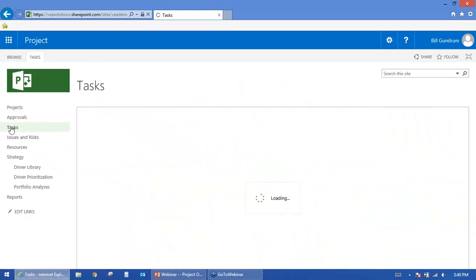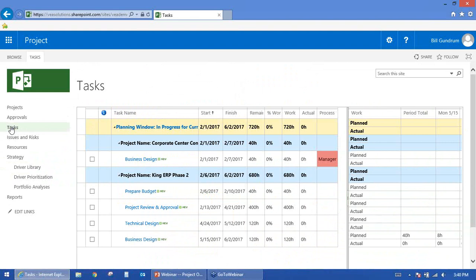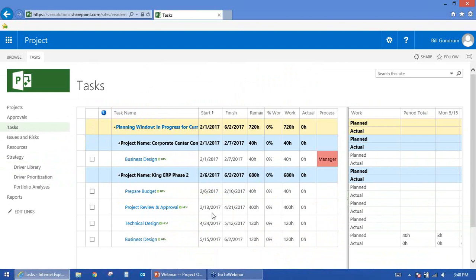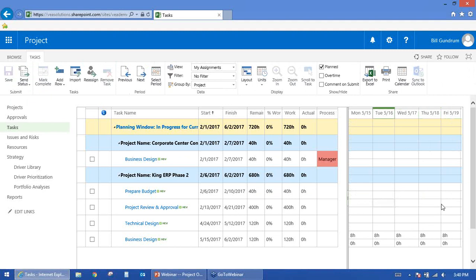Clicking on Tasks shows any tasks assigned to me as a team member working on a project. It shows all the different tasks assigned across different projects, and I can update my progress by start/finish dates, percent completes, or in a timesheet fashion by entering time worked per project per day. If you enable the full timesheet feature, it shows the tasks you're working on plus lets you enter administrative time — vacation, bereavement, and other non-work time — to track an entire 40-hour week.